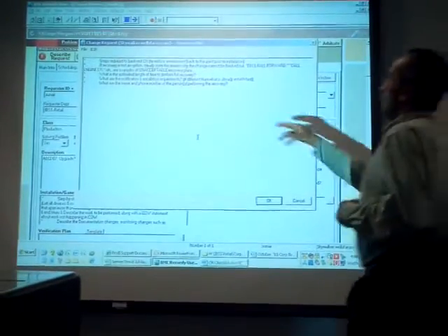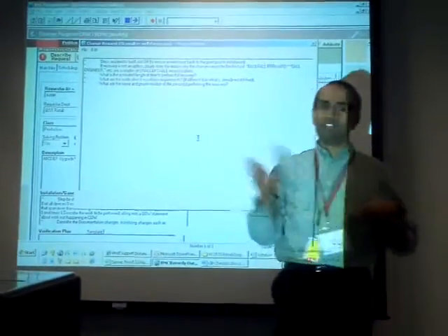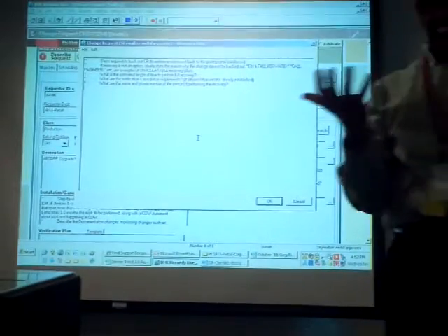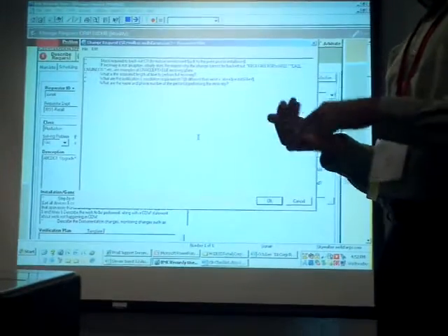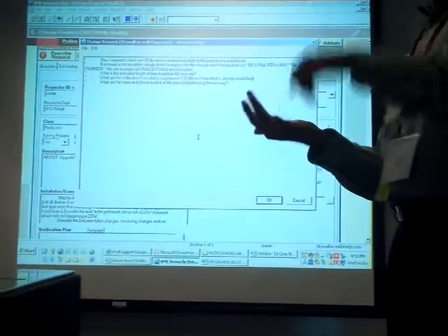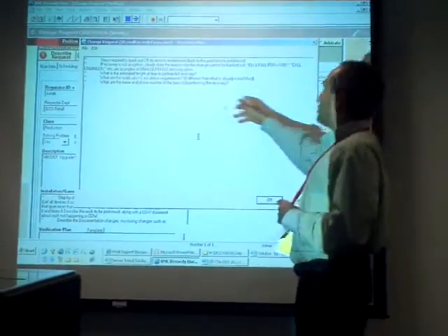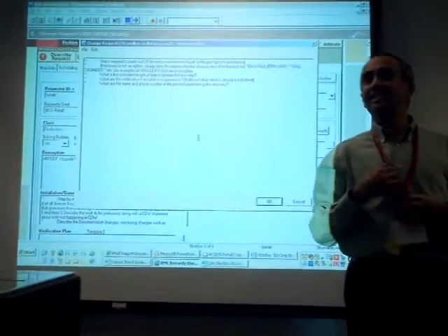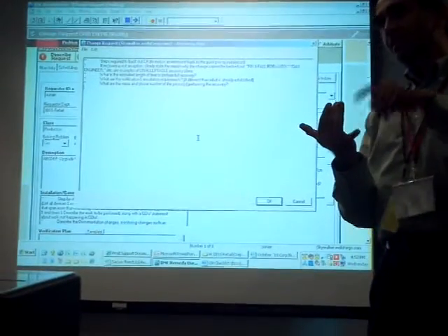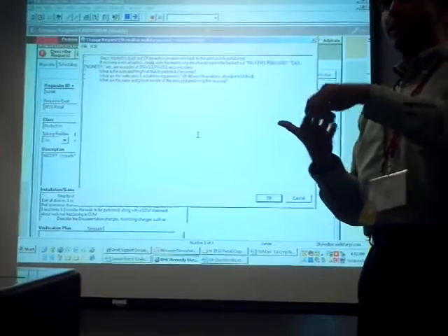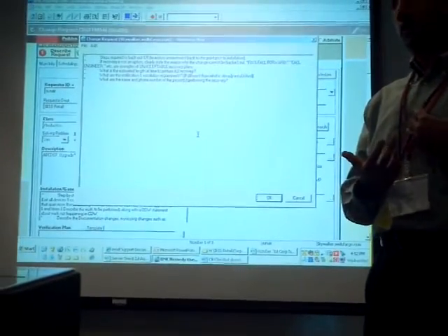Then, what is the notification and escalation requirement? Is there anyone else you have to notify other than the app team? Normally the response is notify the application team. If there's business impact, we go to Echo, and they're notified that there's an impact. Who is going to perform recovery? If there are ECRs that we initiate for the operating system, hardware layer products, we do recovery. We're going to be involved.